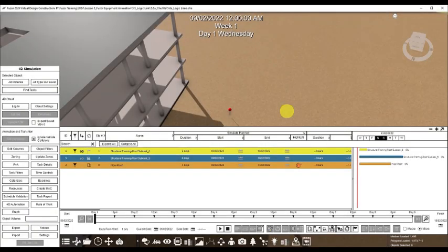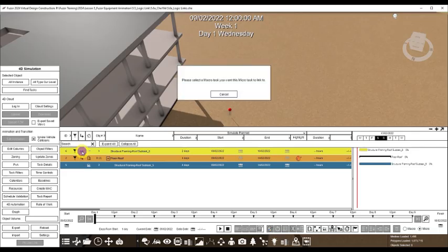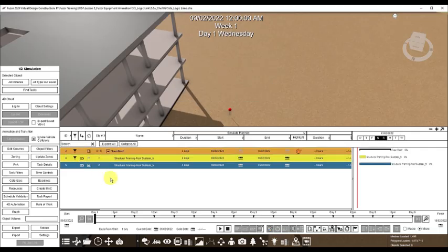You can manually relink the tasks by clicking on the figure 8 icon in the microtask, but first make sure that micro option is enabled for the schedule. Then you can click on the return icon of the macrotask. The microtasks are now linked to the new macrotask.